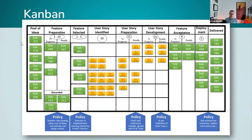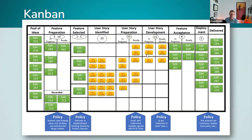In its simplest form, a kanban board is just: waiting to be done (our to-do list) on the left, an in-progress 'doing' column, and a 'done' column. A more realistic kanban board for the type of work we do would break things down at both an epic and story level, with different lanes and different classes of service applied — so work is visible at multiple levels of granularity.